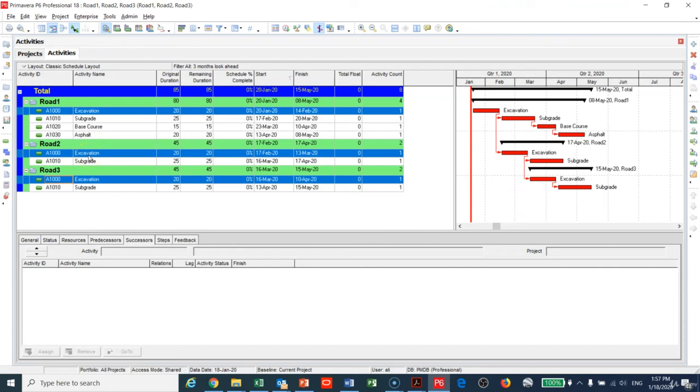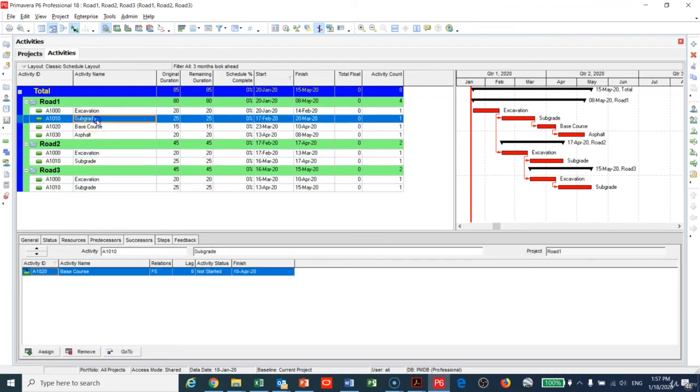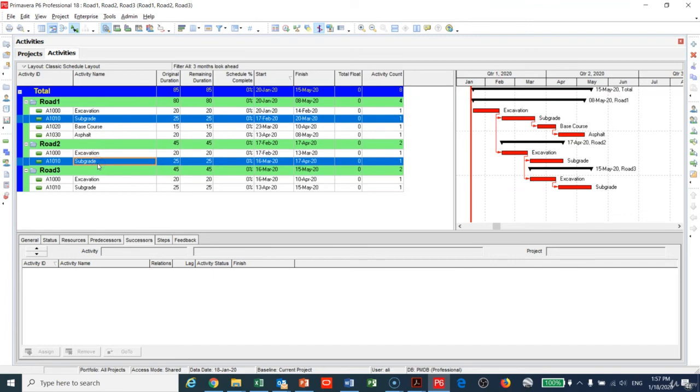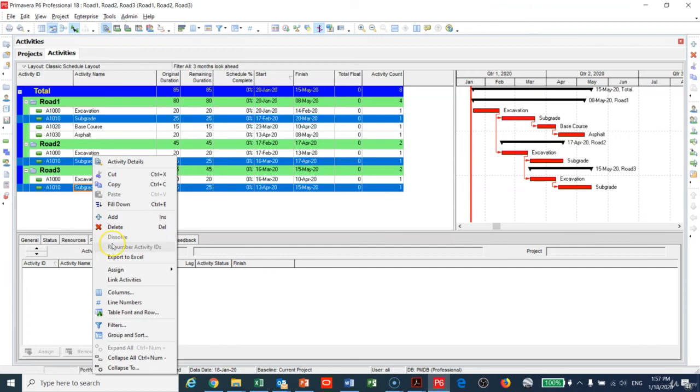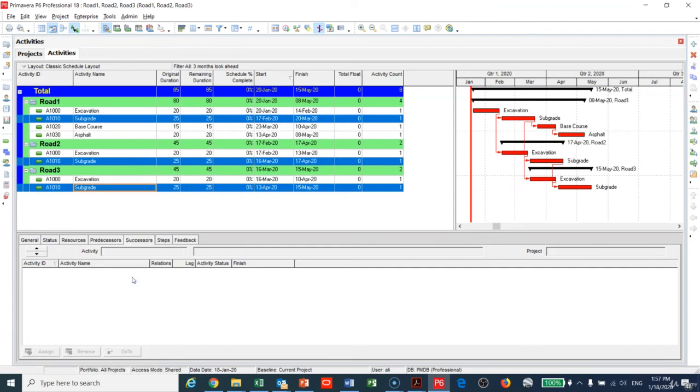Let me tie the subgrade of project number one to the subgrade of project number two to the subgrade of project number three. I will right-click and Link. You can see right now here that the subgrade is being linked.